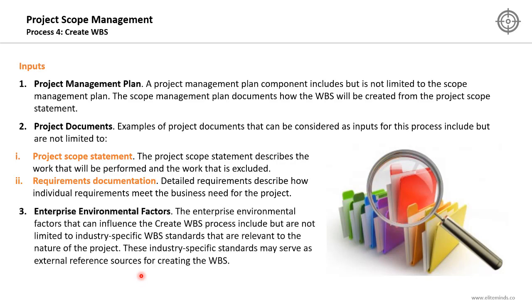Some of the enterprise environmental factors that might affect this process include the industry-specific work breakdown structure standards that are relevant to the nature of the project you are managing. The industry-specific standards may serve as external reference sources for creating the WBS. If you are managing a construction project, you can find in the market a standard or industry standard work breakdown structure